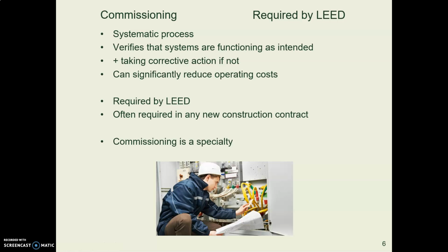Commissioning, I believe we have talked about before when we talked about LEED. Commissioning is required by LEED, and it's that process of verifying that the building does what the designer said it would do. So you may have grand ideas and write them on your drawing, but that doesn't mean anything unless the building actually performs the way you think it will.